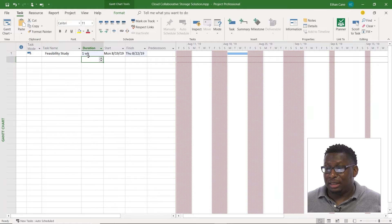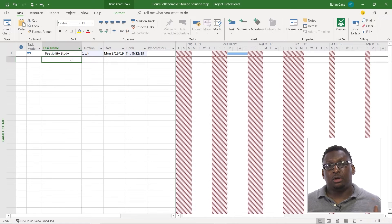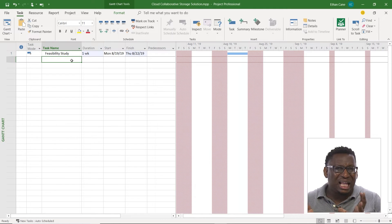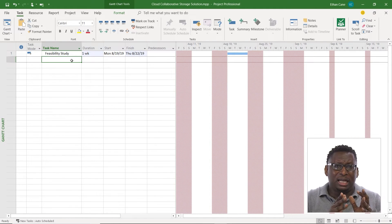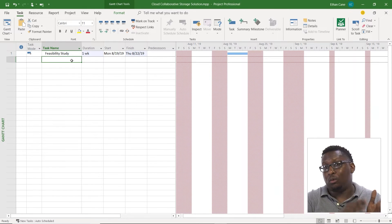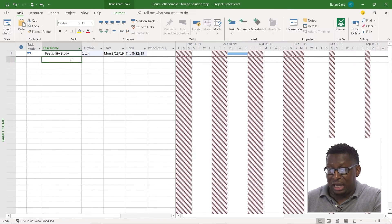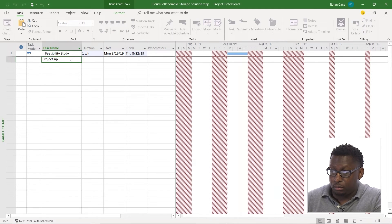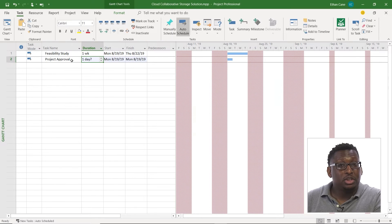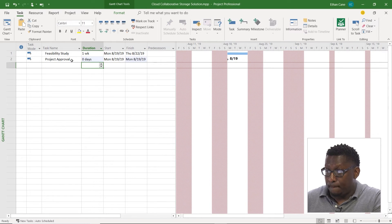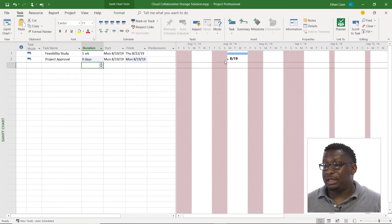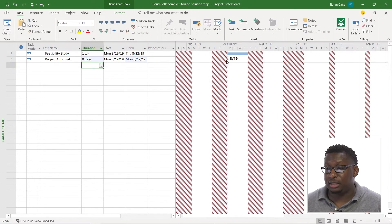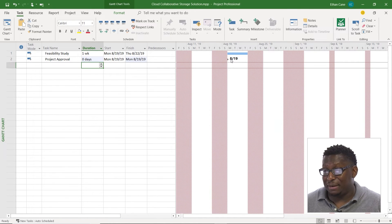Alright, let's enter in what we would call a milestone. Now a milestone is a task that has a zero day duration, there's really no work involved, it's more of a checkpoint or a deadline or kind of an area for a delineation usually that indicates the start of something or a transition from one phase to the next. So we're going to do a milestone here for project approval, I'm going to change this to zero days, and there we go. Now this is a diamond, you can't see the full diamond because the non-working time is covering half of it up, but that is a milestone.